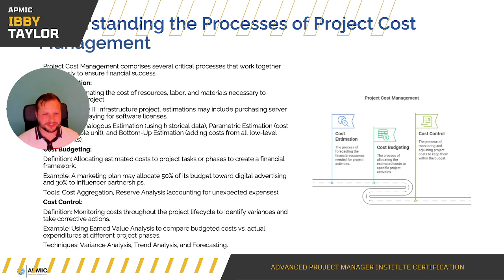So cost management comprises several critical processes that work together seamlessly to ensure financial success. Cost estimation: estimating the cost of resources, labour and materials necessary to complete a project. An example here, for an IT infrastructure project, estimations may include purchasing server hardware and paying for software licenses. Techniques: analogous estimation, using historical data; parametric estimation, which is cost per measurable unit; and bottom-up estimation, which is adding costs from all the low-level components to get an idea of the whole.